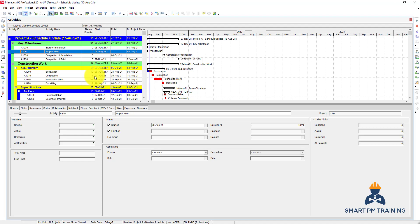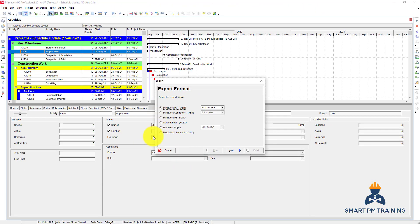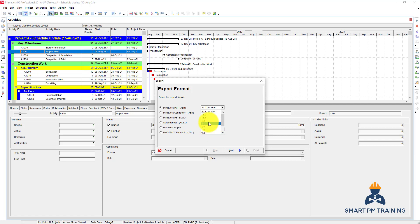You can export the schedule into Excel, or have a backup in Primavera format which is the XER format. To export the schedule, go to File > Export and you have all the options. You can export it as an XER file, which can be opened by Primavera only. You have to select the version — I have version 20.12 installed. If you are working with Primavera 8, you can only export up to version 8.